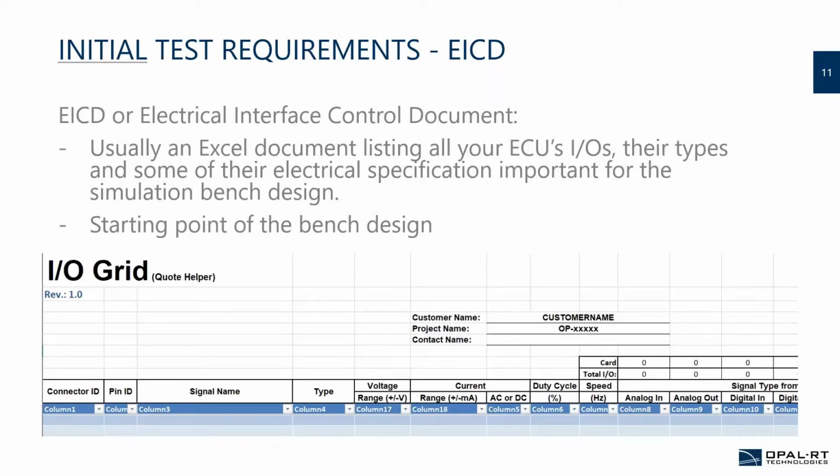Yeah, that's true, Mathieu. And if for any number of reasons you don't have such a document in your templates, don't worry. Most integrators should be able to provide you with a template of their own to start with, and that can be done as early as the quoting phase. So you can ask the sales representatives of the different integrators you're in communication with to provide you with such a template. It's also going to show you a little bit of the seriousness of the integrator and how involved they are in the aerospace industry, because it is literally the starting point of the design of the bench, like Mathieu mentioned.